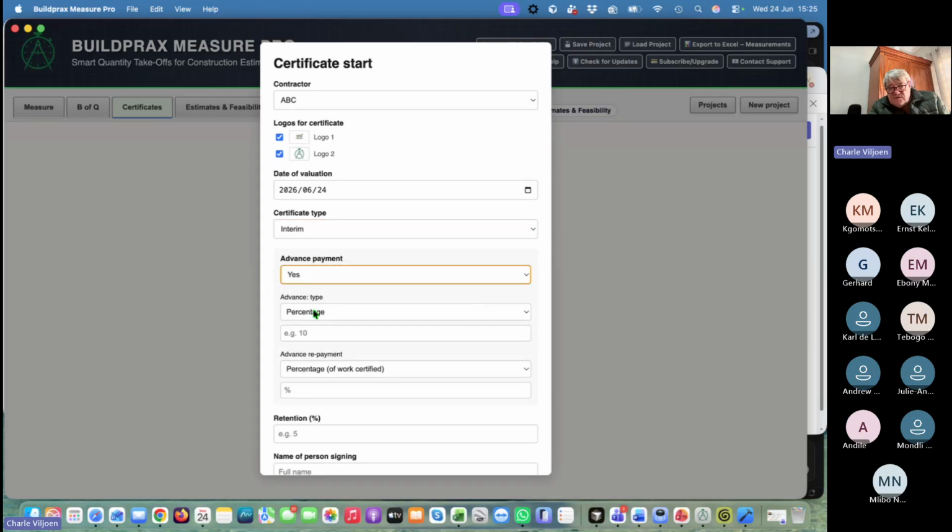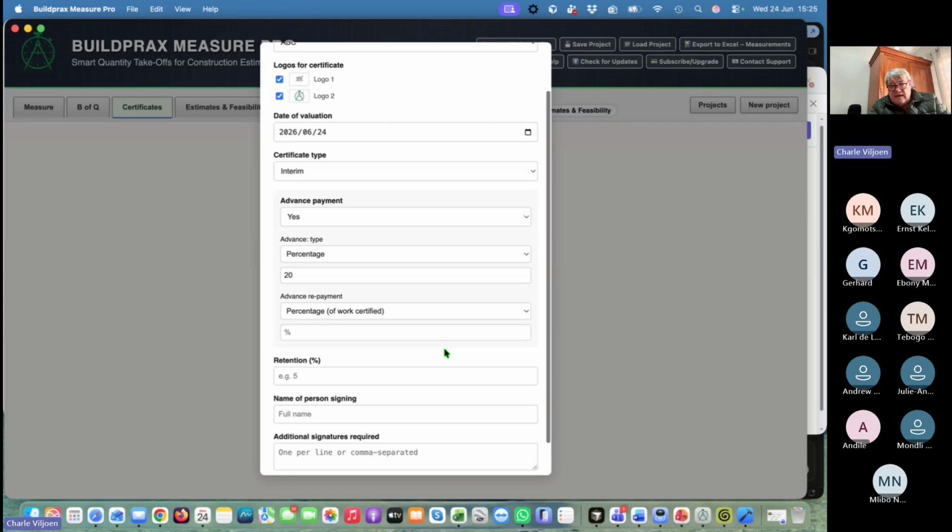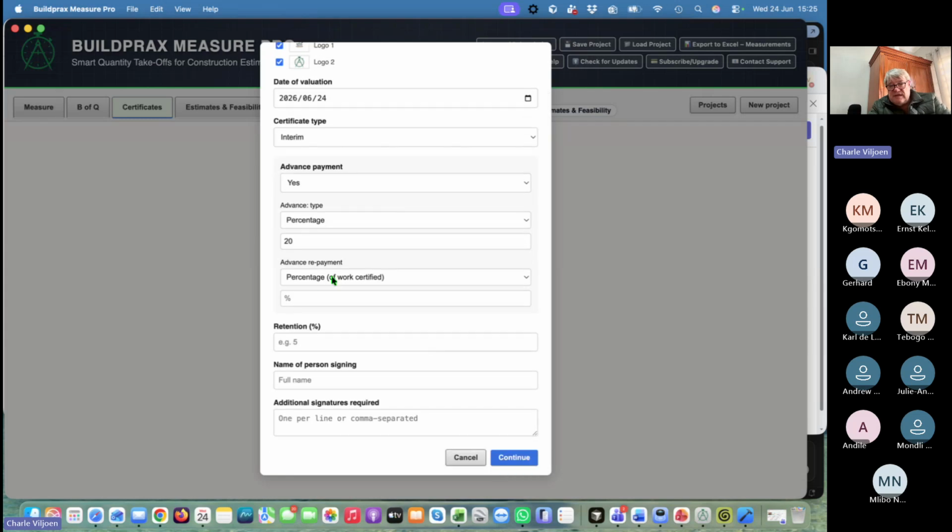Is it a percentage, or is it just a value? And you say you can choose a percentage or a value. I said, listen, that's a percentage. Let's say it was 20%. And how you're going to repay it, we say, all right, it will be a percentage of the certified work. I like to sometimes say, all right, let's put it at 25%, so you make sure that he pays back his advance payment before the end of the contract.